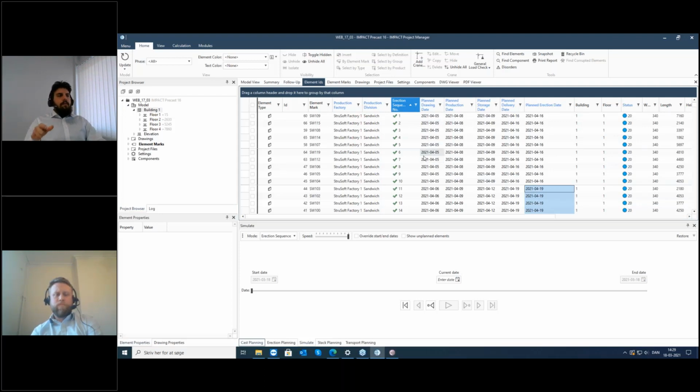By adding this data in the database, we have now notified, or basically activated, a production planner, who knows in the database that those elements from this specific project have to be produced on the 8th, according to my rough estimation. Of course, according to how busy you are in the factory, this can be changed. We can always go one day up or one day down. But by changing that, we will also change the expected plant erection date according to the dependencies that we have set.